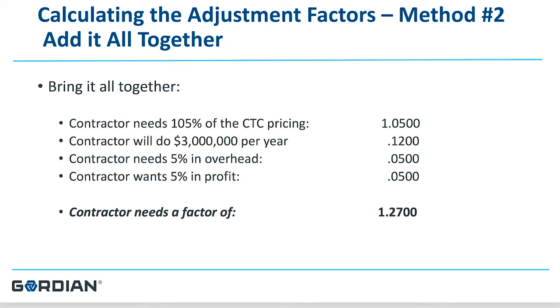Understanding the unit prices and their value is critical to your assessment and calculation of factors. Somewhere in the middle is the right adjustment factor for your company. The risk of a low adjustment factor is that you'll be offered one project and quickly realize that at such a low factor, you cannot make money. The risk of a high adjustment factor is that the owner may call you out on only one project and find your proposal value very high relative to their budget. So carefully consider as you calculate your factor.